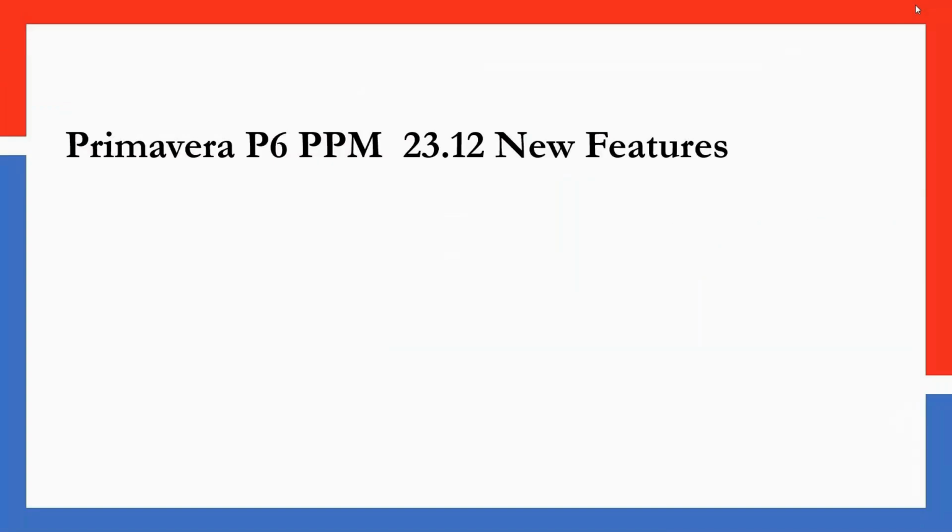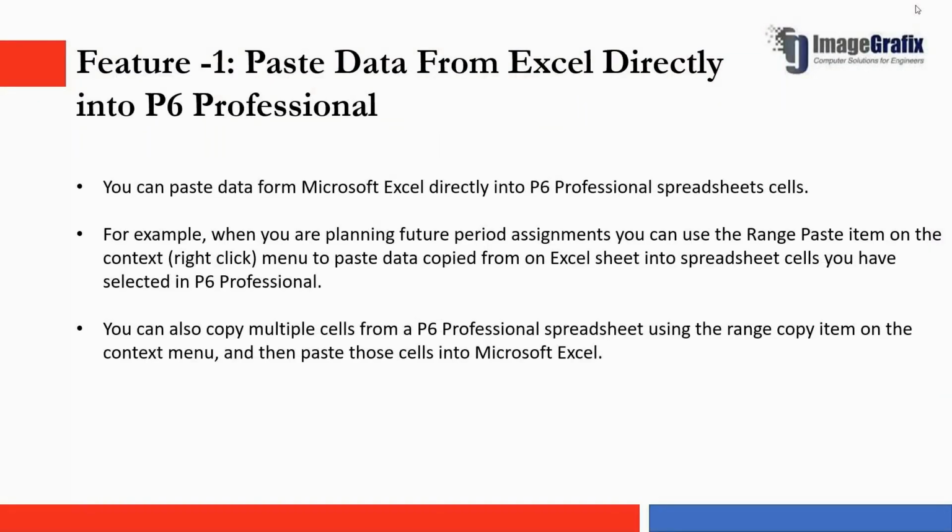And next, now we can go to the new features in Primavera P6 PPM 23.12. The first feature is that we can paste data from Excel directly into P6 Professional. This is one of the very useful features we have now. We can copy the data from Excel and paste the same into the P6